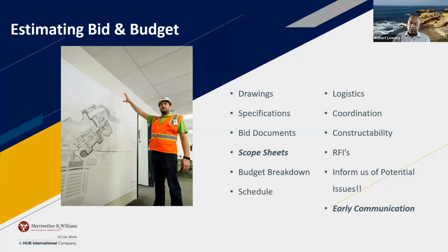And the other thing is, with those numbers that you have, and you're the successful bidder, you've been awarded the job, the next thing you're going to be doing is buying out stuff early. Do not wait 6-7 months, because you have not locked in your suppliers with that current price. Once you have them on the contract, they're going to have to honor that price. If you wait months and months later to write them a subcontract agreement or PO, they're like, hey, I was not on the contract, this is my new price. You're going to have to eat that cost. So just be aware of the buyout process. Do it early, as soon as you can. Get everybody locked into those prices.